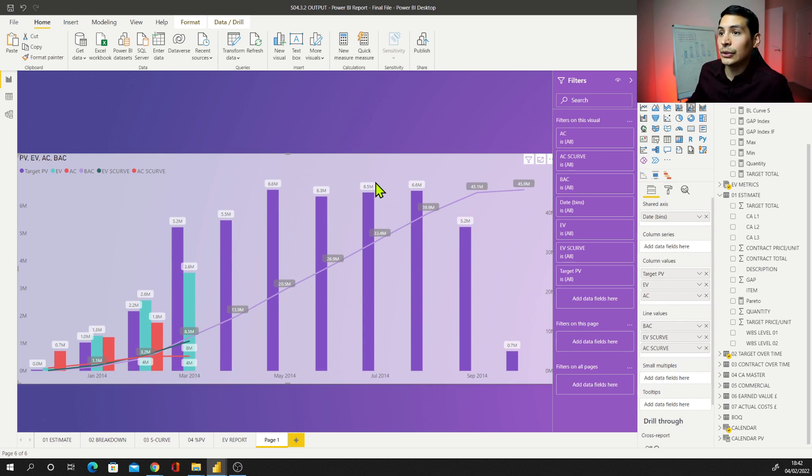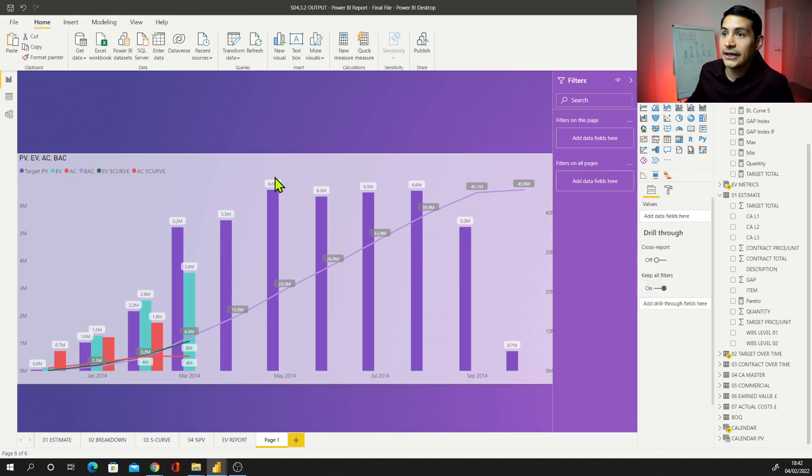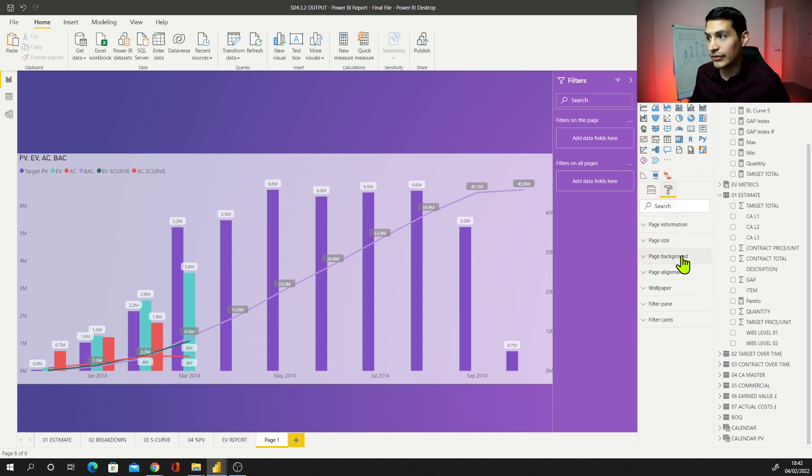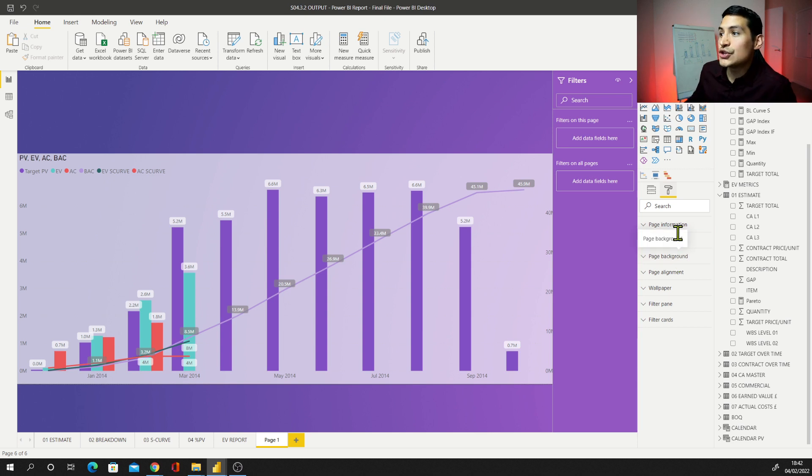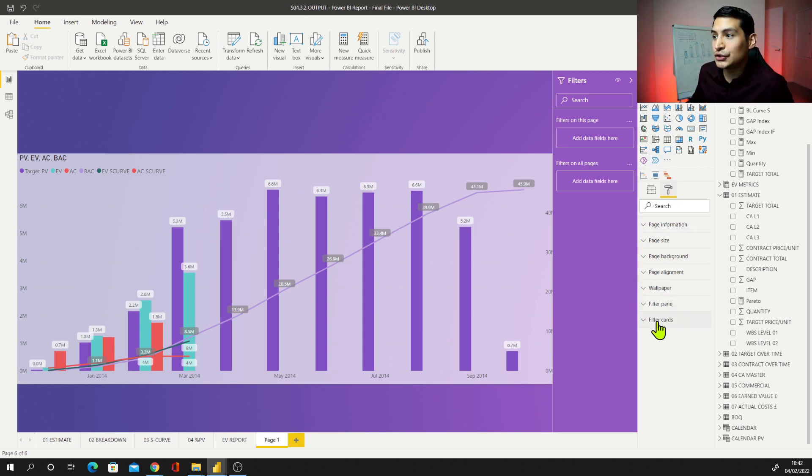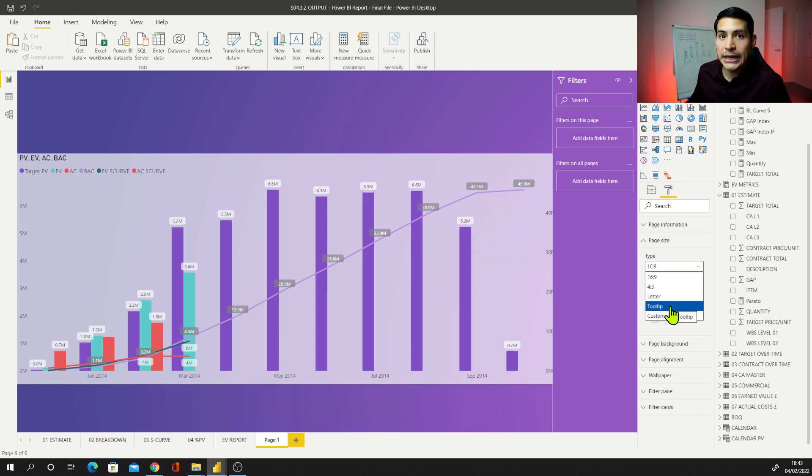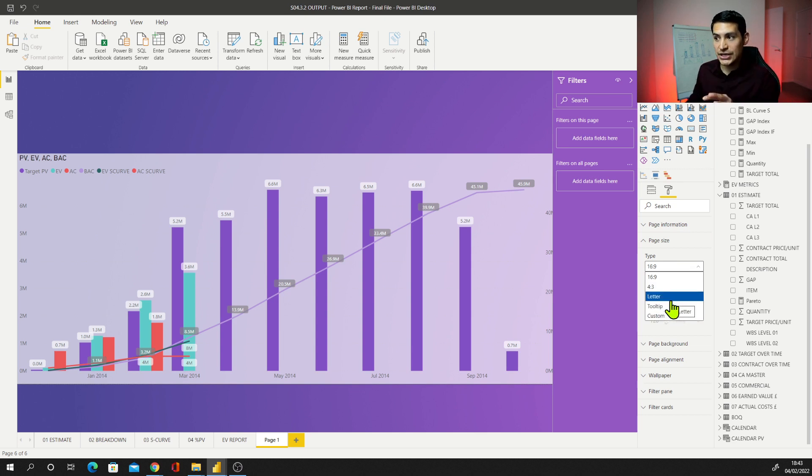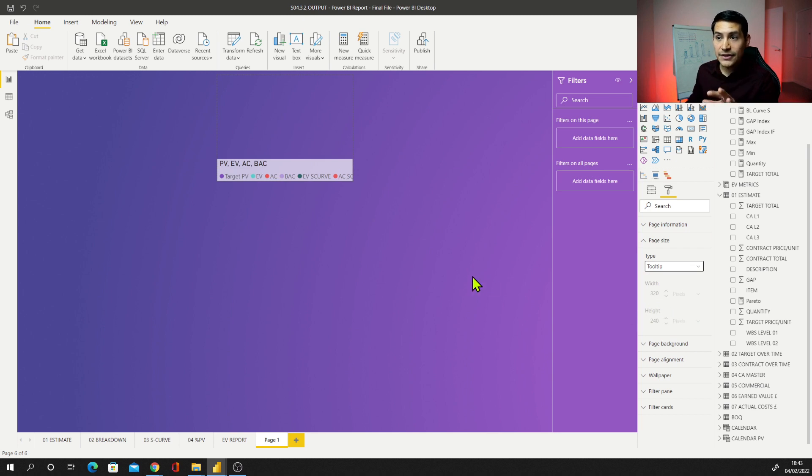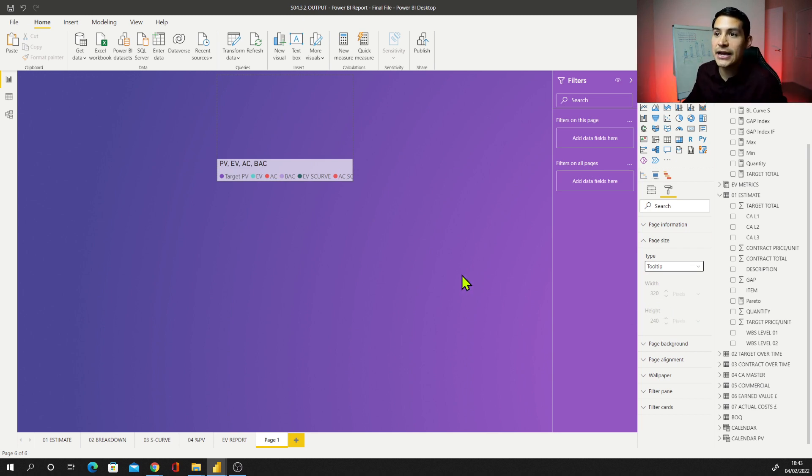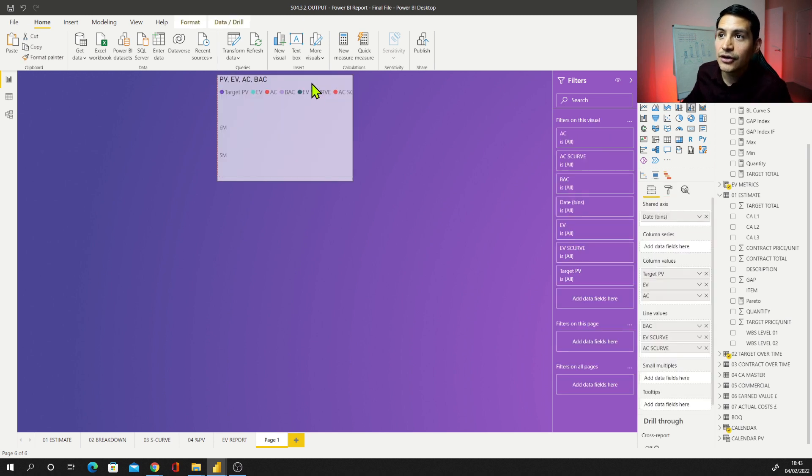And the next thing I'm going to do is unselect the visual, click on the blank canvas, and go for the formatting options I got for the page. If you go to formatting, then you can select page size. Instead of having this one, I can select that tooltip page size. So I'm going to go for tooltip. Now I have this, but my visual was too large, so I need to resize it to fit in.